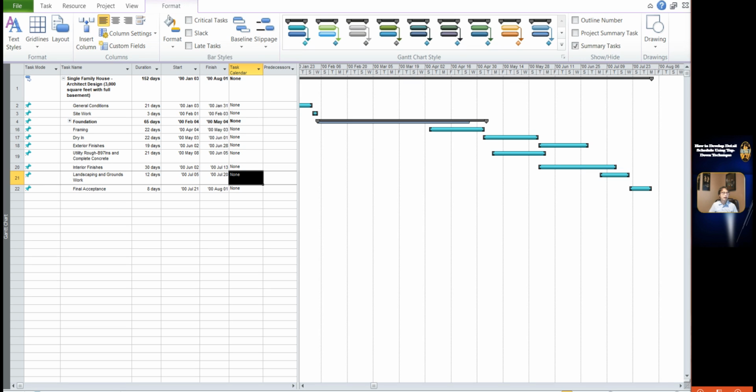First of all, let us see the high-level schedule here, but this schedule cannot be used to guide the construction. The duration for high-level activity is based on the experience referred to the similar project. Use this given duration on the foundation. We can develop the construction schedule with the top-down techniques.